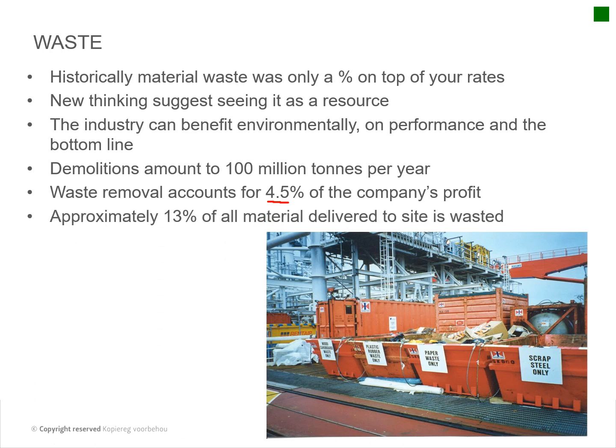Then approximately 13% of all material delivered to site is wasted. That's quite a staggering amount. And that's just the waste of material. There's other items which you can manage well as well. It's like your site offices. If you manage your tools and sheds and so on efficiently, the less containers you have on site, the less your overheads per day. So that's the stuff that you can think about.